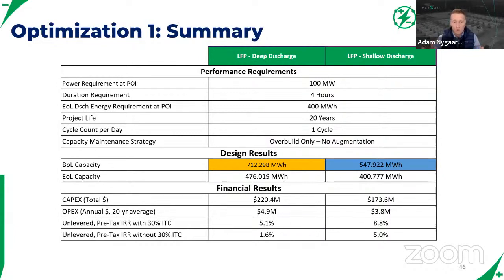Hey, maybe the first 3 years you're doing just ancillary services or the shallow discharges. And then maybe you want to be more conservative and assume from years 4 to 10, you're doing energy arbitrage, or maybe it's some kind of combo of the two. If you take that next step of going to that level of sophistication, you can really optimize the size and optimize returns. Yep.